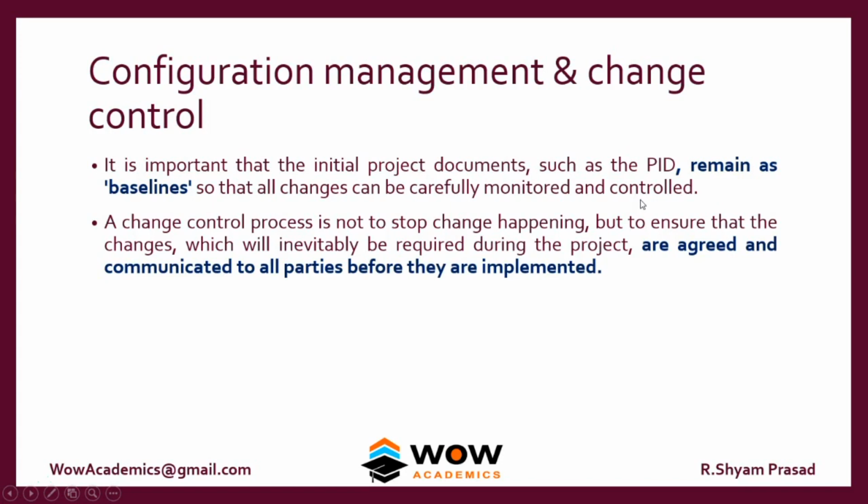But we have to compare, say, version 6 and version 0. Only then will we know how different version 0 and version 6 are. So every version, like version 1, should be compared with 0, 2 should be compared with 0, 3 should be compared with 0. Only when we compare it do we know how much change has occurred from version 0 to the latest version.